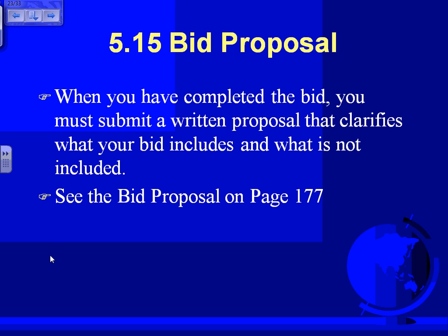Warranty does not apply if any payment according to this proposal is due, including change orders. So one year. Warranty does not apply if any payments according to this proposal become past due. So if you don't pay me, I'm not going to guarantee you anything. Any question, guys, about this?